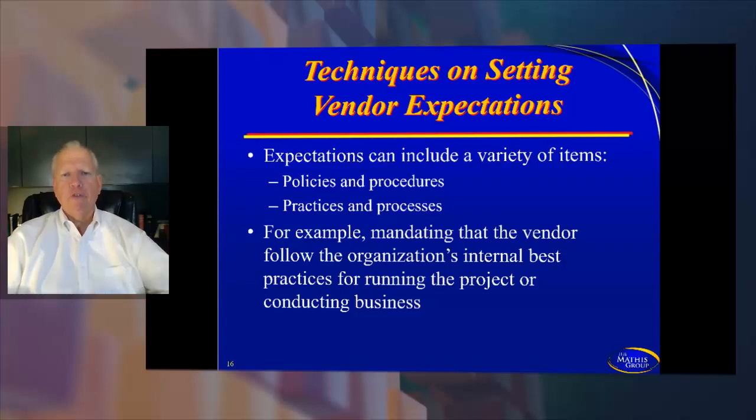Okay, so you hire a vendor, and the vendor decides they're going to do their own thing. The vendor can do their own thing if they're doing 100% of the project and they're not having to interact with any of the stakeholders. The vendor can follow their own processes. But if the vendor is doing part of a project within the culture on site with you, they need to understand the processes or the best practices of the customer, because all the rest of the team is probably following those best practices. The vendor must comply with the best practices of the customer if they're on site, if they're working with the team in that manner.